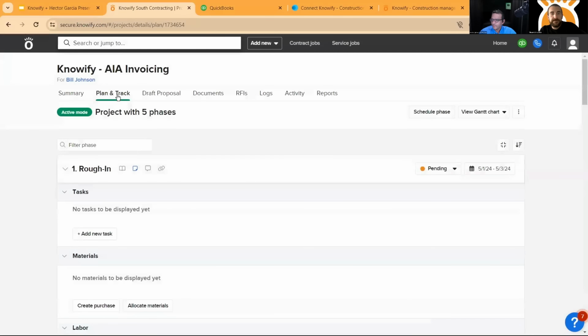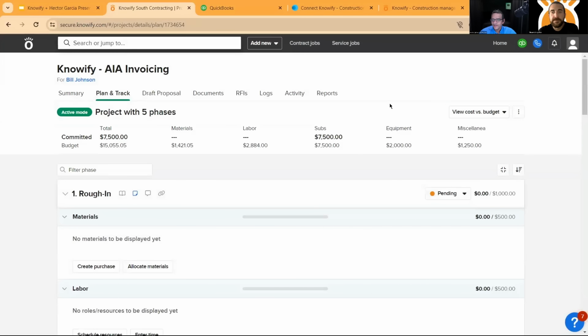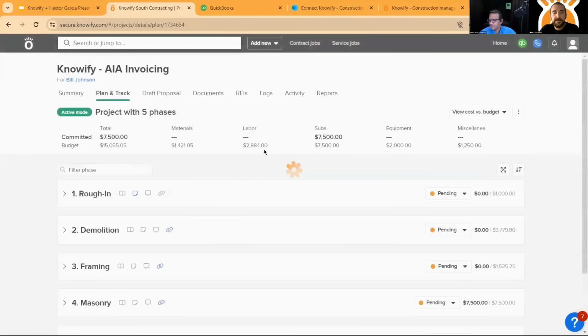And QuickBooks is an accounting system, which means you only record things that have happened. You're talking about estimating how much you can make if the project does go through. So usually you can't see this type of information in QuickBooks because this is non-posting information. So when it comes to planning for a job, trying to figure out how much to charge for a job, how much my job is going to cost me, and how much am I going to make on the job at the very end, this is where I know it could be very useful, because you don't have to actually post any transactions in QuickBooks Online to get calculated amounts.